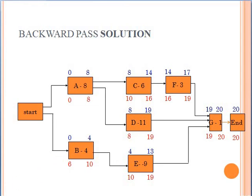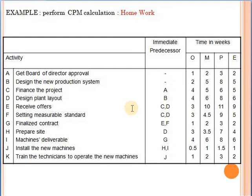This is how we do the calculations related to the CPM — the critical path method. When I say perform the CPM calculations, this means you will have to draw the network, put the duration for each activity, do the forward pass calculations, the backward pass calculations, and determine the critical path and its duration. All of this is considered as doing the CPM calculations. Thank you for listening.